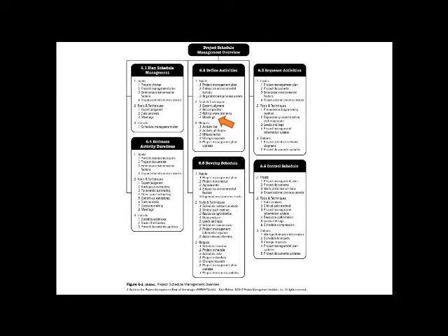Anybody who's ever attended any of my courses knows that I love the yellow sticky exercise, and I love developing schedules with groups of people as opposed to sitting at my desk. As much as I love the computer software tools, and I love developing schedules, it really is like a big puzzle for me, and I enjoy it very much. I recognize the value of doing it with a group, of creating realistic schedules based on team input. And so the PMBOK has put meetings as a tool and technique over and over again in developing the schedule to emphasize that you don't do it in isolation. You don't create a project schedule in isolation.